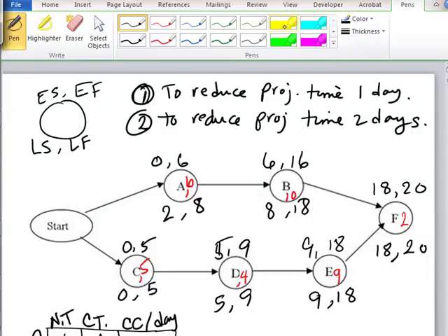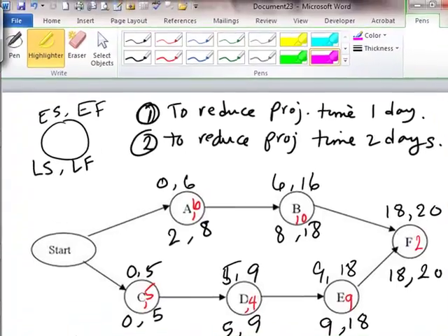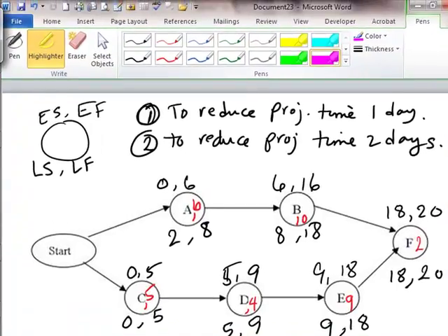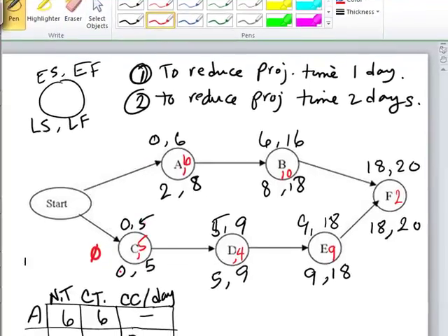So we have identified the critical path because of the slacks, of course. Slack here, I will use red color. Slack here is 0. I'm sorry, not there. Slack here is 0, because 5 minus 5 is 0, or 0 minus 0 is 0.